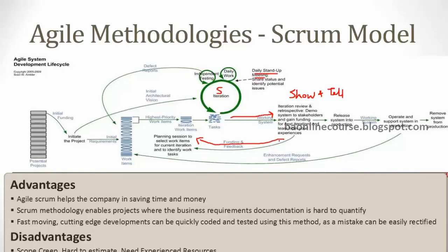Okay, and after maybe 2-3 sprints, you'll feel that this is a decent version which the team can use. They'll give it as a release. So release and sprint are different, right? There could be multiple sprints before you make a new release.